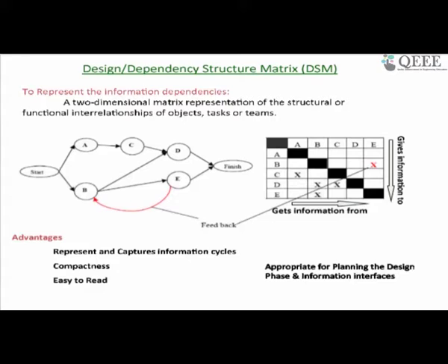One of the big differences between the design phase and the construction phase is that a lot of the dependency information in design is based on information. In construction, we know that dependency is based on physical and resource. Okay, in design it's based on, one, yes, resource, two, information available. And while we are all aware that design is iterative, and only through iteration does design become improved, obviously we don't want construction to be iterative, right? Iteration in construction means rework, and we don't want that.